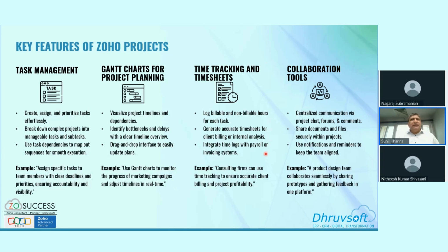Next, Zoho Projects helps you with time tracking and timesheets. Now, very important for some of the companies where you do billing based on the time that your consultants are spending on the project. So your consultants or the users can log their billable and non-billable hours, and we can clearly define it. They can generate accurate timesheets. They can submit these timesheets for the clients to approve from within Projects itself. And you can give these clients access. You have a special access which you can give to your clients also, so that they can log in and they can see and approve these timesheets. So that's another feature which is there in Zoho Projects.